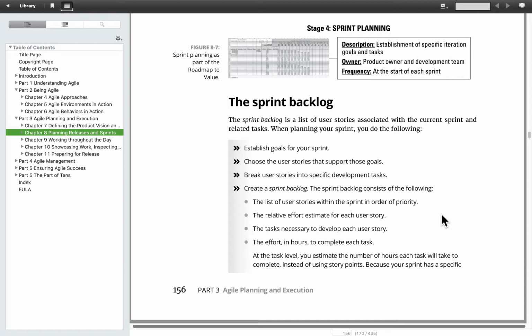So there's a point of view that comes from the development team that leads towards good sprint planning. And there's the point of view that comes from the product owner, who should have maybe a greater marketing focus. And the collaboration is we decide what's going to fit into a sprint. And of course, the number of points that work adds up to should be consistent with what we think we can do.